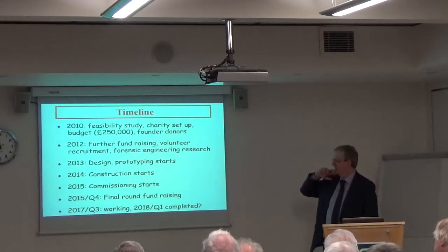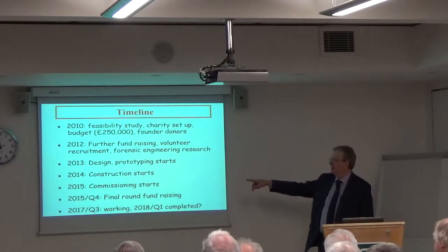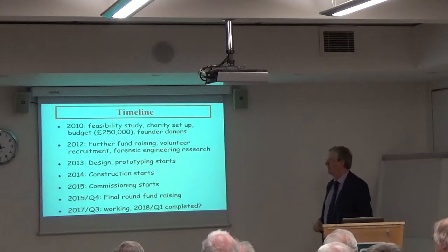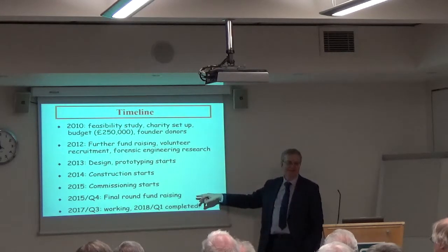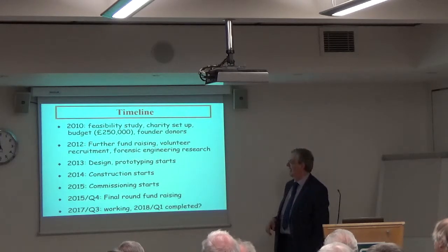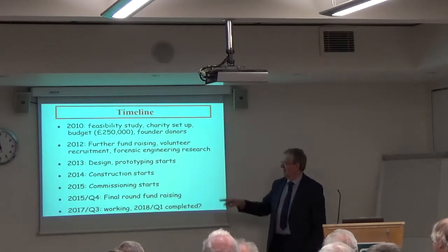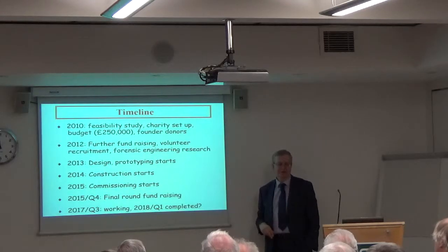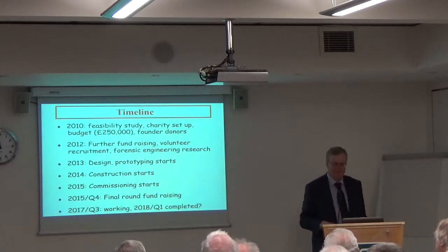Construction starts in 2014. Commissioning starts in 2015. By commissioning, I mean people starting to join things together in different parts of the machine. Final third round of fundraising, just like a startup, we had an A, B, and C series. But IPO sometime next year. And where are we now? I hope that we'll be running programs of some sort by late summer, early autumn this year. We're on the threshold of that, and that by very early next year we can complete it in the sense that the machine can be handed over from the commissioning team to the operations team, whoever that turns out to be, probably the same people.